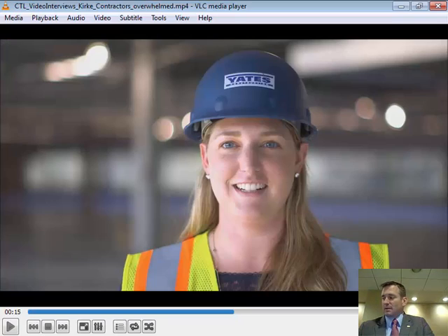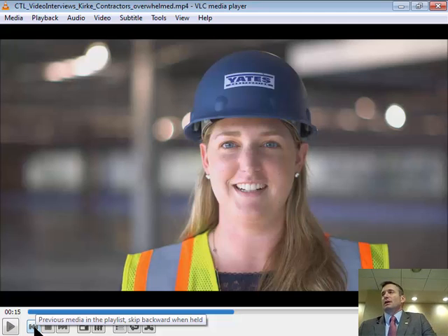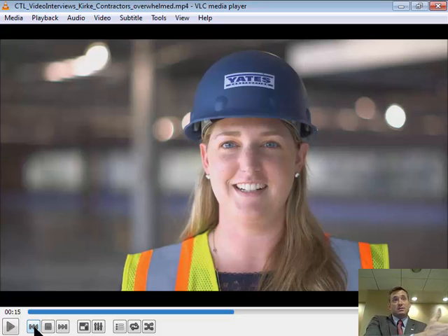Now this is one of the managers on the project, and her job was transitioning, and we realized we had to have a consultant, somebody that could spend a lot more time with these contractors than our team was able to give, to teach them how to do BIM, why we were doing it, to help them improve and change their processes from a different perspective. See, because my team, the CM team on the project, would have been focused on the model, the building, the end game. By being able to get those contractors to hire this consultant, they were paying the consultants, not us.